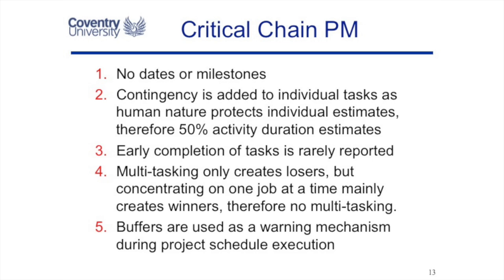The third concept of critical chain is that when people finish a task early, they don't report it. If you finish a task late, it's going to have a knock-on effect on the following tasks. But if you finish a task early, you probably don't report it — you keep quiet until it's time to deliver. Multitasking is our fourth concept. Critical chain suggests that multitasking creates losers, whereas if we don't do multitasking, we're going to create winners.